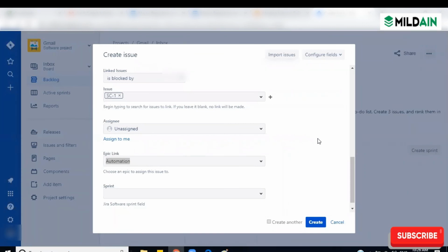But unfortunately, if you open the story and you see the version number as 1.3, but you all know you are in the 1.0 version, then you can ask the product owner. If this is a 1.3 story and you kept it on the top of the backlog, then definitely that could be his mistake. He will move it back to the bottom, and only 1.0 stories will be pulled to the top of the backlog. That will be his headache. Okay.